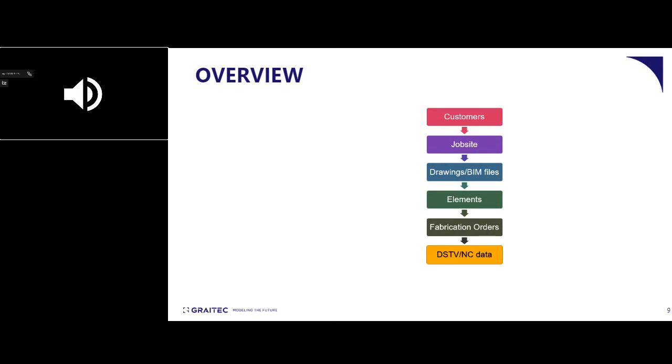So some of the subtasks that we're going to take a look at when talking about the structural elements: we need to once again take a look at what we have in stock. If we do have stock, then allocate it to said project. And if the stock levels are low for whatever material, then you need to go through the purchasing process, the procurement process, and then manage those logistics. To facilitate that, of course, we have a nesting module that will be linked to the fabrication order.